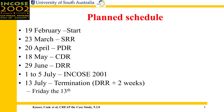The schedule was planned to cover about a semester. It started on the 19th of February and would go through system requirements review, preliminary design review, critical design review, and delivery readiness review right before the INCOSE 2001 symposium. While we were at the symposium, the students would have a chance to fix up any defects discovered at the DRR. Termination was scheduled for two weeks after the DRR on the Friday, which was the last day of the week.